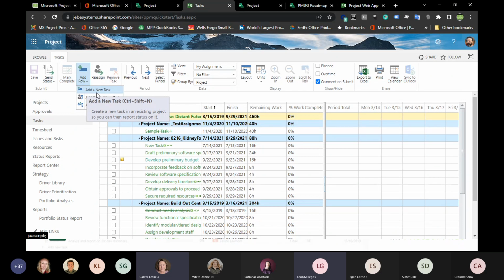So the project manager must approve that new entry by the team member. They could set up rules to automate that, but typically they're going to want to review that task update being made by the team member, and then upon acceptance, it will go directly into the schedule, right? So there is certainly some of that. And they can even do things like reassign the tasks. They can suggest that they get removed from the task. So there's a lot of back and forth that can happen between the team member and the project manager as you assign them to tasks. So that's definitely built in there.